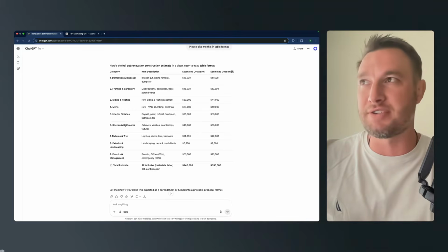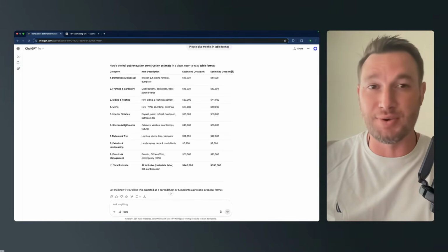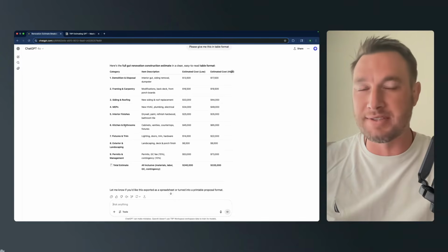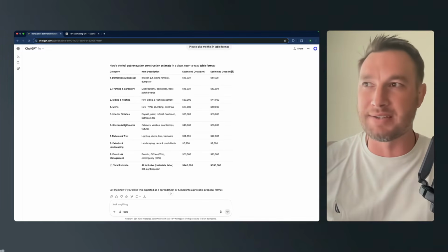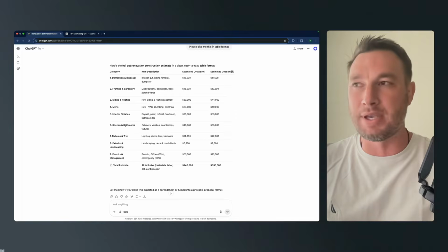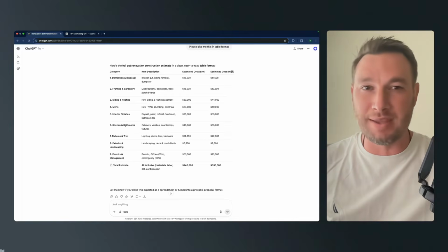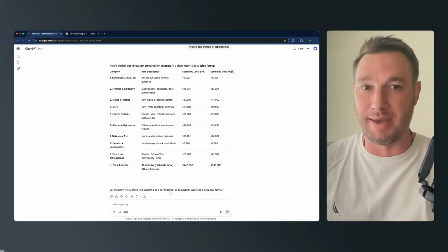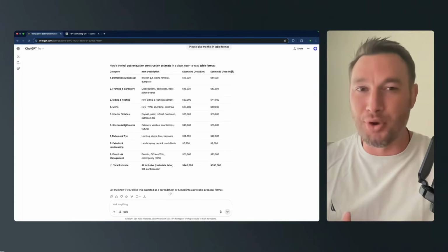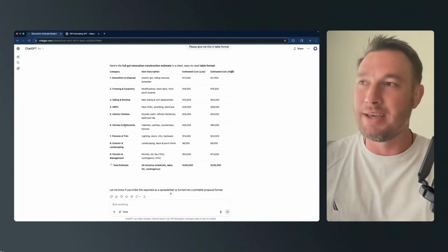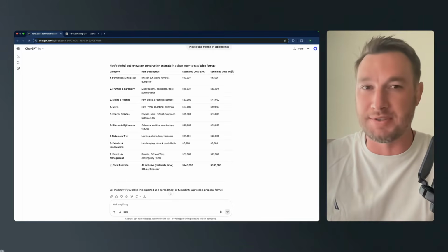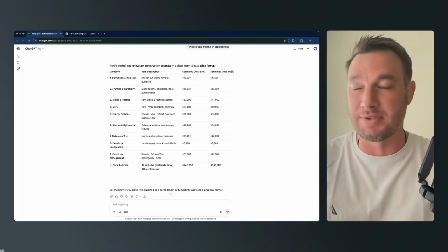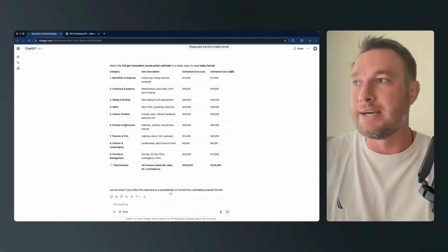A full gut renovation at 2,000 square feet should be, in our area at least, $160,000, at the most $200,000. You can maybe get it for $150,000 or $140,000. I know people will say, oh, we can get it done much less than that. If you're in expensive markets, you're going to think, oh, it's much more than that. I know my costs. Normally, if I was doing 2,000 square feet, it'd probably be about $150,000 to $160,000 for a full gut renovation, all new everything. It's got to be a nice renovation, of course, not all builder-grade stuff.